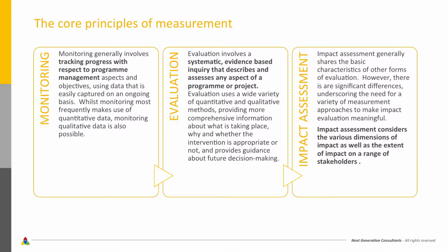It looks at specifically 5 aspects. Was your program relevant to the needs? Does it address the needs? So relevance is the first thing that must be tested in evaluation. Was it effective? Was it efficient? What is the impact? And is it sustainable? So it speaks really now to the outcomes.